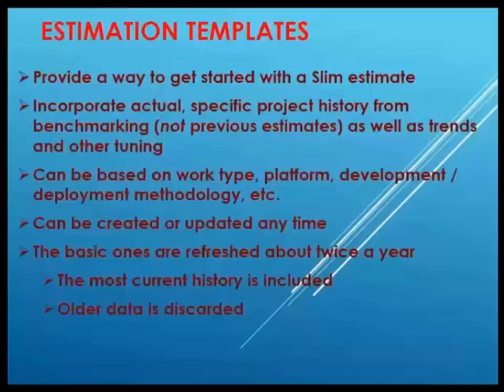The templates can be based on really anything you want: a work type, a platform, development or a deployment methodology, et cetera, et cetera. I'll talk about this in a little bit more detail in a minute. You can create a template at any time. You can update them at any time. My organization has some basic ones, and we refresh those twice a year, and that's just the way it's worked out the best for us.